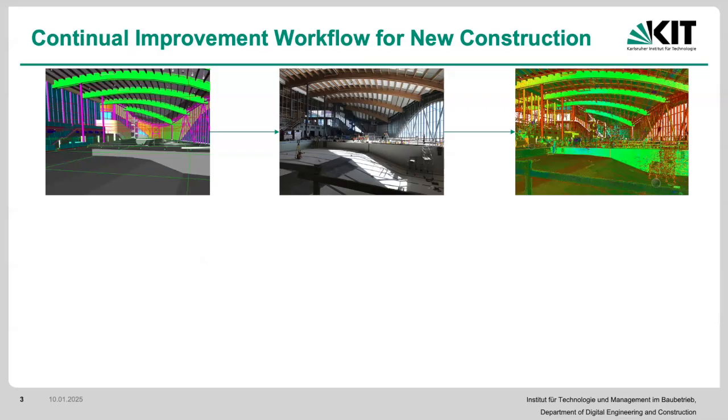And this extra check could come from optical instruments, it could come from IoT sensors, whatever it is. Preferably it's going to be some sort of sensor system that gives us some frequent data that we collect. Based on the data that we collect, we go ahead and compare it with our plan, see if it matches. This could be in terms of progress, this could be in terms of quality, or this could just be in terms of our analytics. We're going to be collecting this data, hopefully to have some historical data that we're going to be using for other aspects later on as well, right?